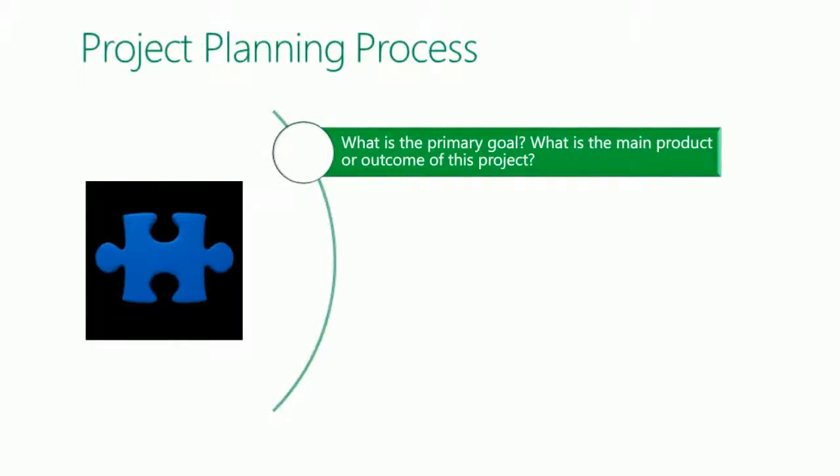So when we think about the theory of organizing a work breakdown structure from a best practice standpoint, I call it sweeping verbs into logical piles. What are the actions we take as a project manager and a project team to actually build the outcomes? So we need to have some kind of organizing principle. A very common one would be a development methodology, how we design, build, and test, for example.